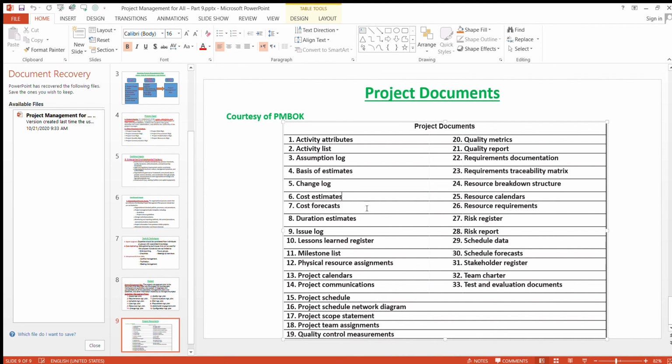So we have a budget. We said that we're going to execute the project with this budget and this cost, and this is phased on a timely basis and activity basis. So we use this baseline to compare it to the actual expenditure in order to keep track of the budget.